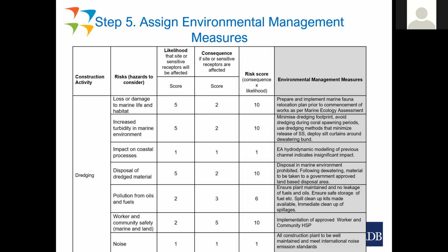It's better, in my view anyway, if you're having to do any significant ecological mitigation, to get that in the hands of specialist people that you as the client or the project manager or the implementing agency have more control over, and let the contractor focus on his construction work. So that's what we did here at Port Vila. We have undertaken that marine fauna relocation plan in accordance with the recommendations of the Marine Ecological Assessment.